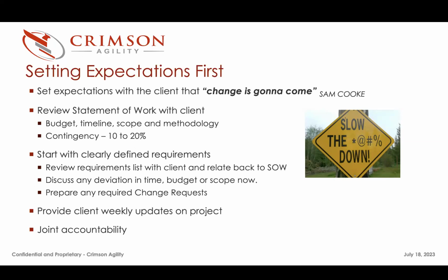Not always possible. I know Patty's dealing with a client that is just not completing their action items. They're not making the decisions. They're not providing the inputs that we need. And so that first 2 to 3 weeks is dragging on. But we've already told them through project status reports that the project's now delayed because we didn't complete this design and planning phase of the project as planned.